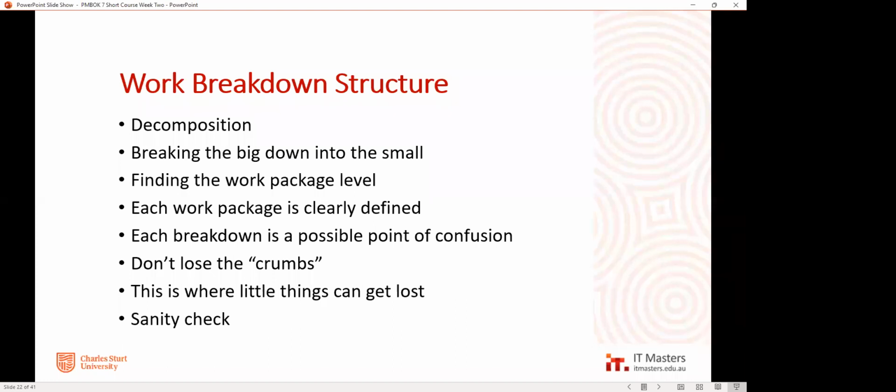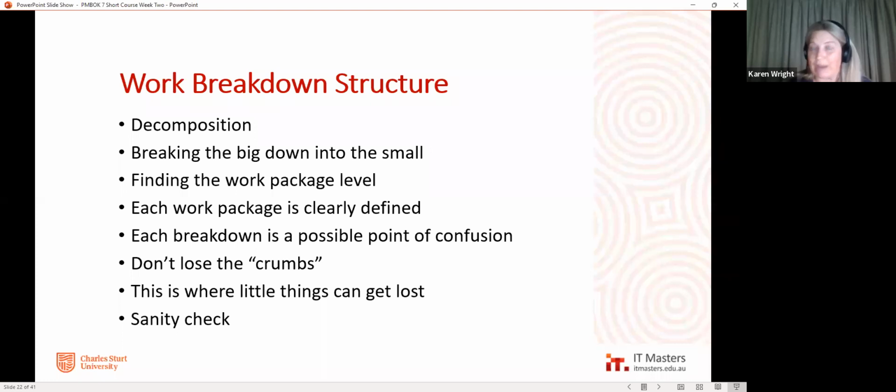Okay, in RACI terms, who is responsible for the business case, project manager or sponsor? So the accountable party is always the sponsor because the buck stops with them. They're the person who's going to use that business case to make a decision, but it's often the project manager who's responsible for developing it. So we would develop it within the project team.